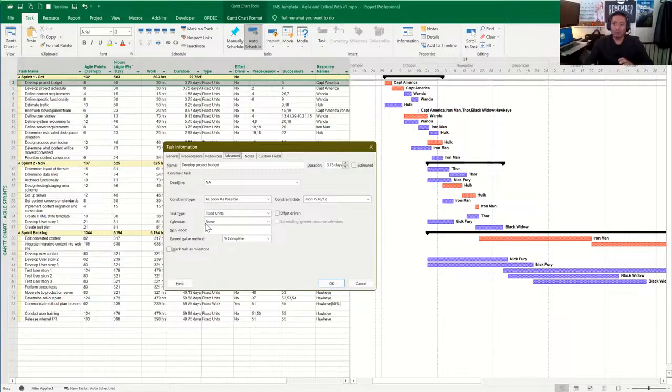So why I'm always saying that is because if you ensure and manipulate what you want in the project options, it will automatically assign it to all tasks that you're creating. So you won't have to mess with these types of areas in your schedule. It would just be generated from that project options.